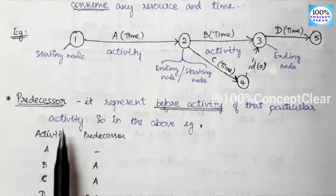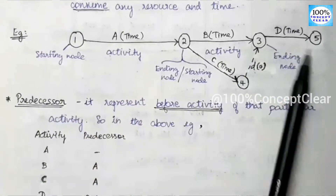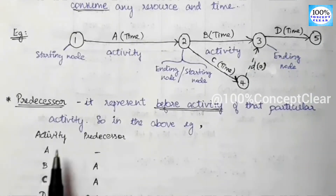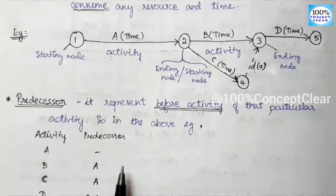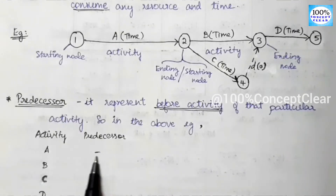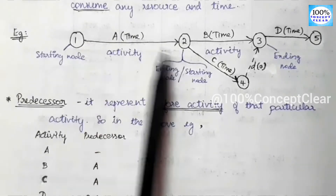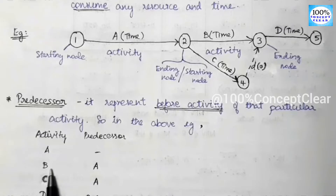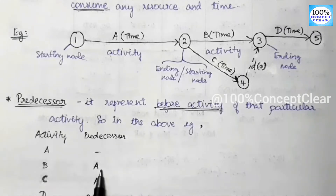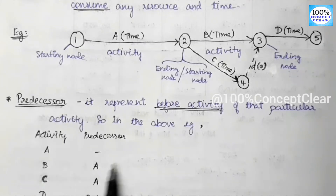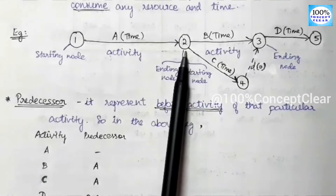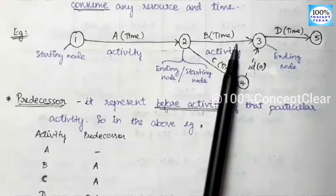For example, consider activities A, B, C, and D. Activity A has no predecessor — it is the first activity. A activity will start first and complete. Then B activity is called after A activity, so A activity must end before B activity starts. Similarly, C activity also calls A activity as its predecessor. A activity completes at the second node, and then B and C activities can start from that node.